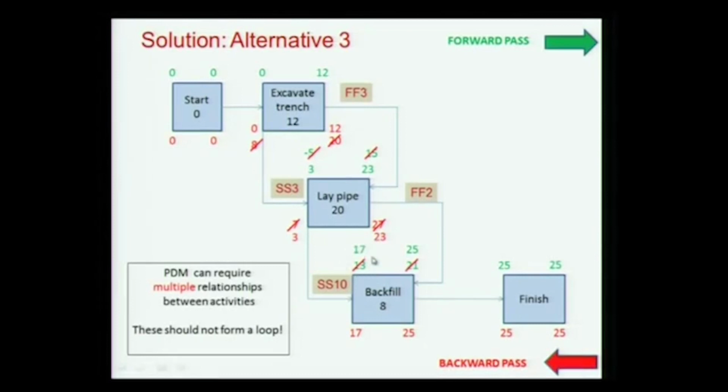Okay. So just to give you a little more insight on the question you asked, you're basically suggesting, and to the others, start this on 13 and extend it all the way to 25. Okay. So nothing prevents me from starting on 13, right? Meaning I'm unconstrained. Only thing is then my duration hasn't changed. So right now I'm staying with constrained duration, meaning I'm constraining my duration to be continuous. The activity will be continuous.